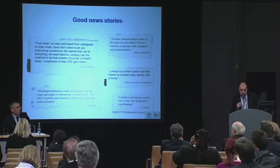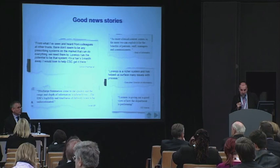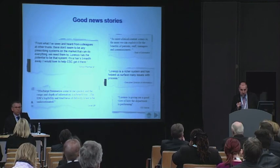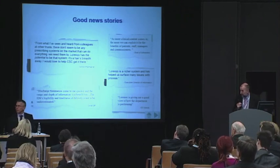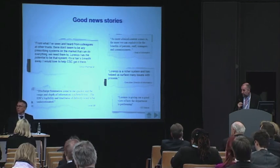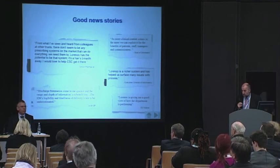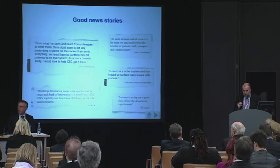In terms of the sale of the product and so on, that is something that we didn't do particularly well, and we accept that. So we're moving into it area by area, and I think we've learnt from that, because we're thinking hard about implementing inpatient prescribing. We're very well advanced, just putting the finishing touches to the software. We're going live in May, but we've thought much more critically about baselining our current operations and anticipating what benefits we might get, so that we can measure them. So I think we've gone through some of that learning.